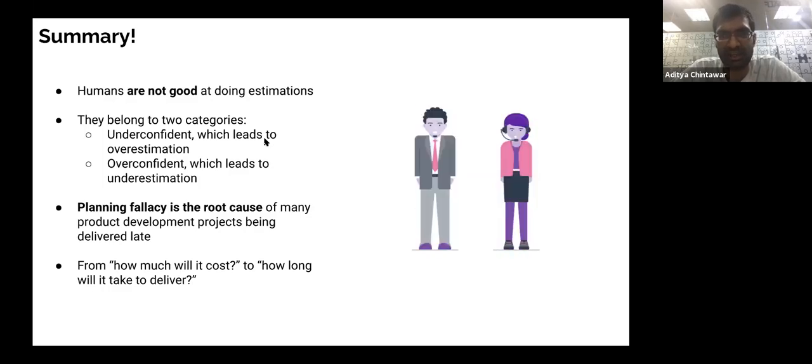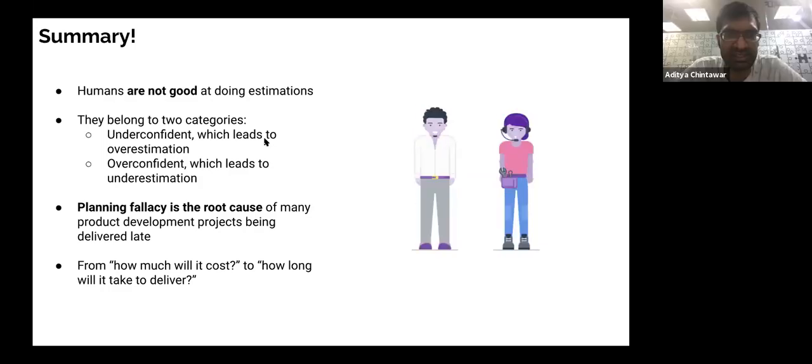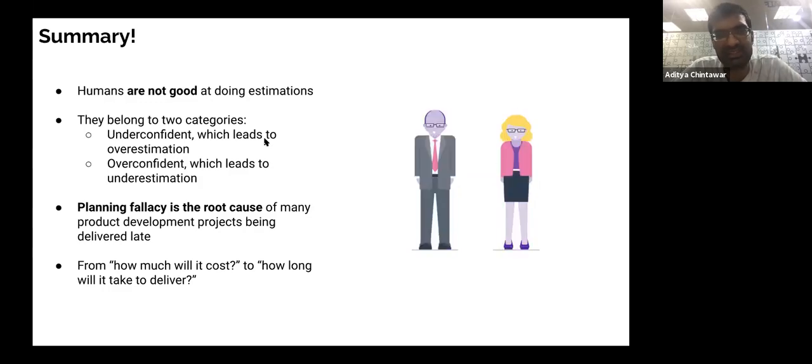Now, the person giving the requirement, usually the product manager, tends to be overconfident because of the kind of association he is in constantly, right? Bulk of the time, product managers end up talking to business, data, marketing, and there the mantra is only go to market fast, right? The GTM has to be fast. But when you look at the engineering side, there is tech debt, there is structure, there is architecture, there is how you want to do a particular thing. And that's when the planning fallacy usually results in delays in the product development or release cycle.